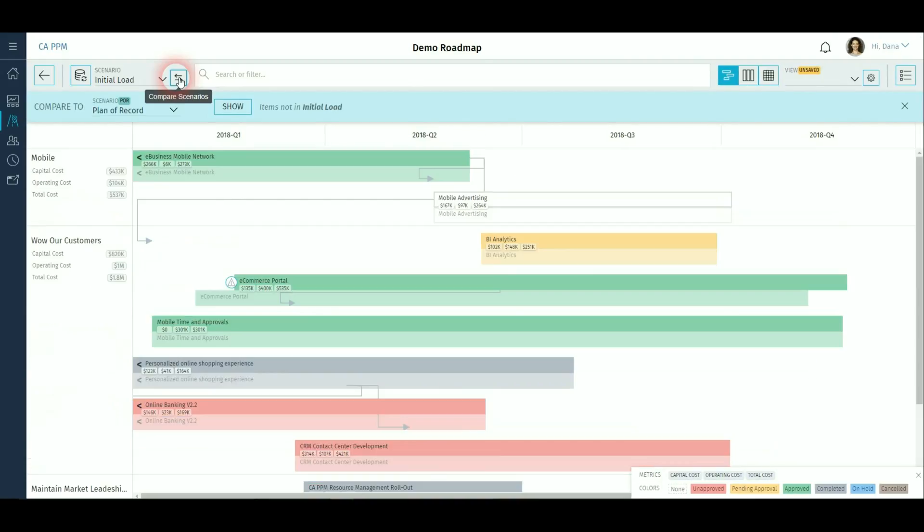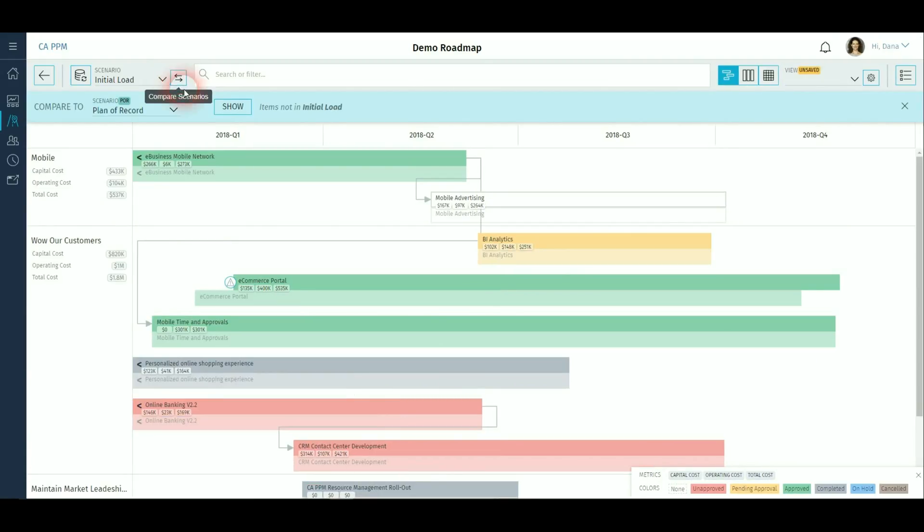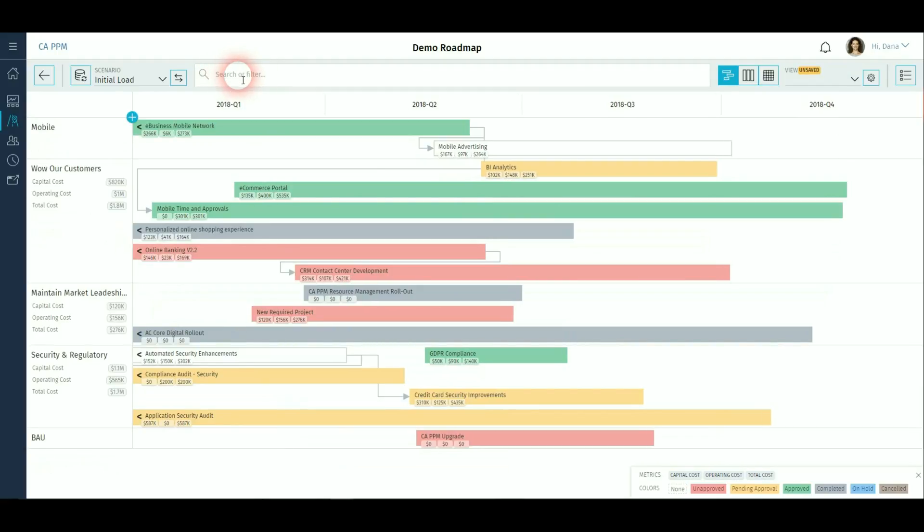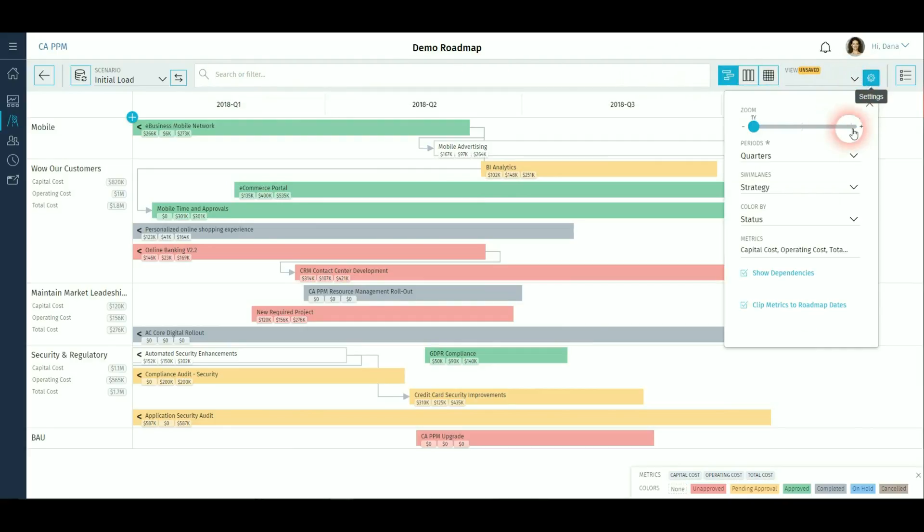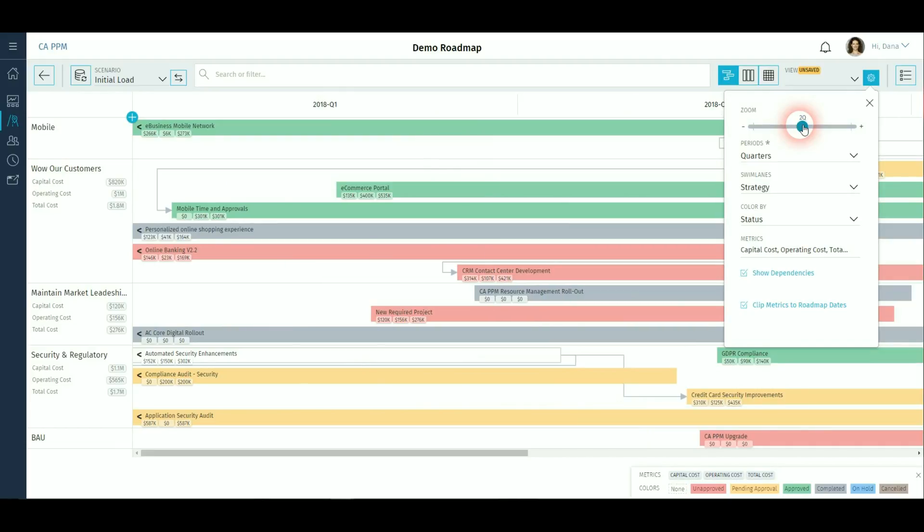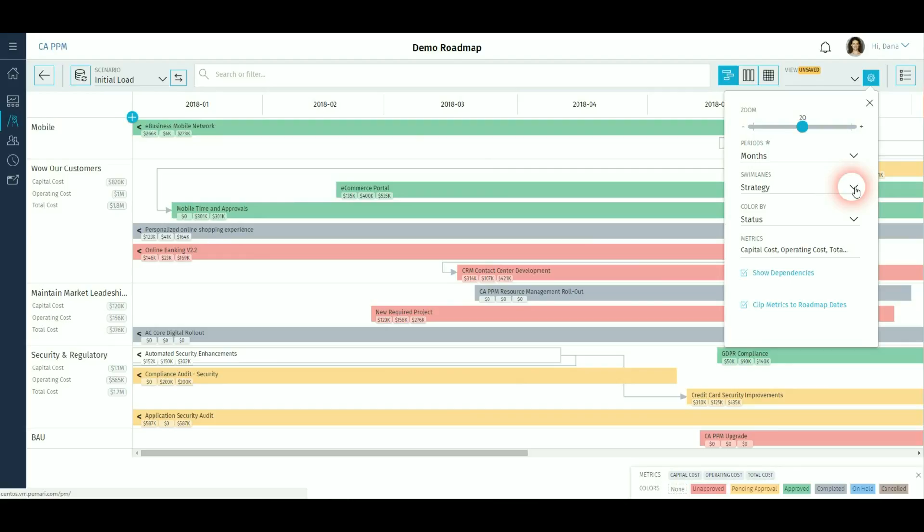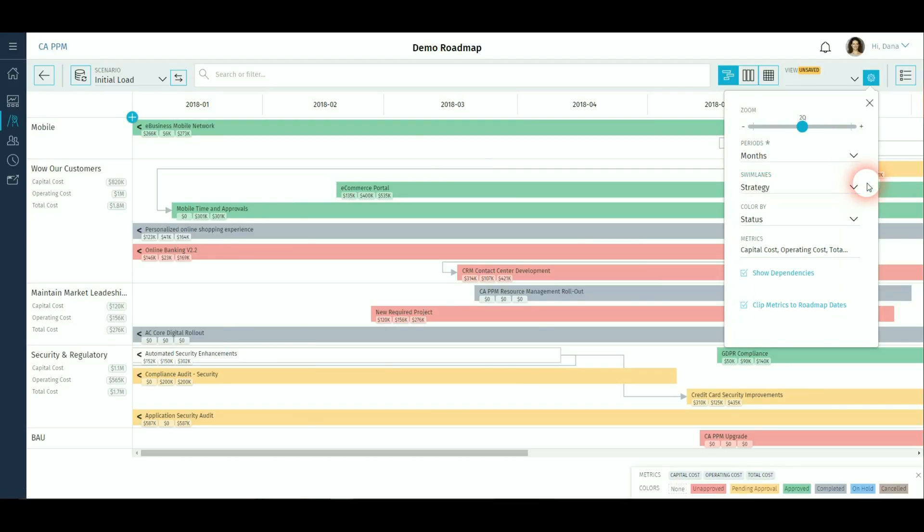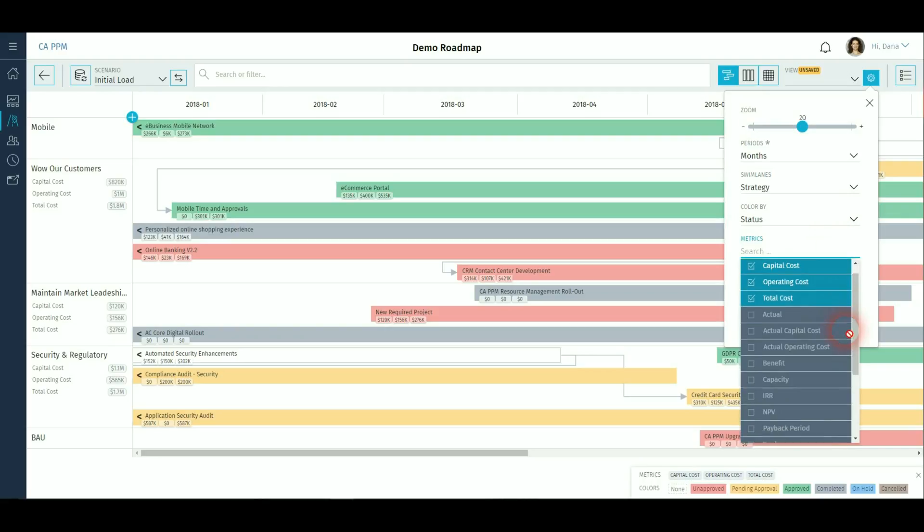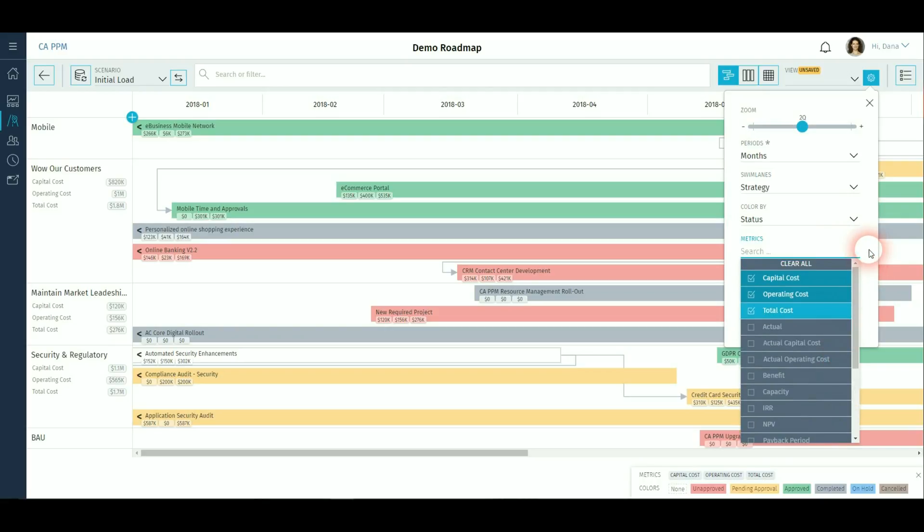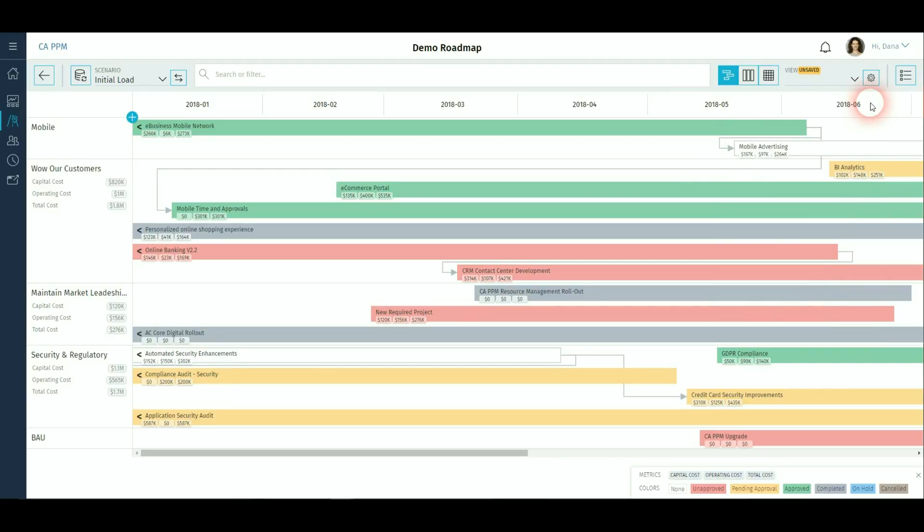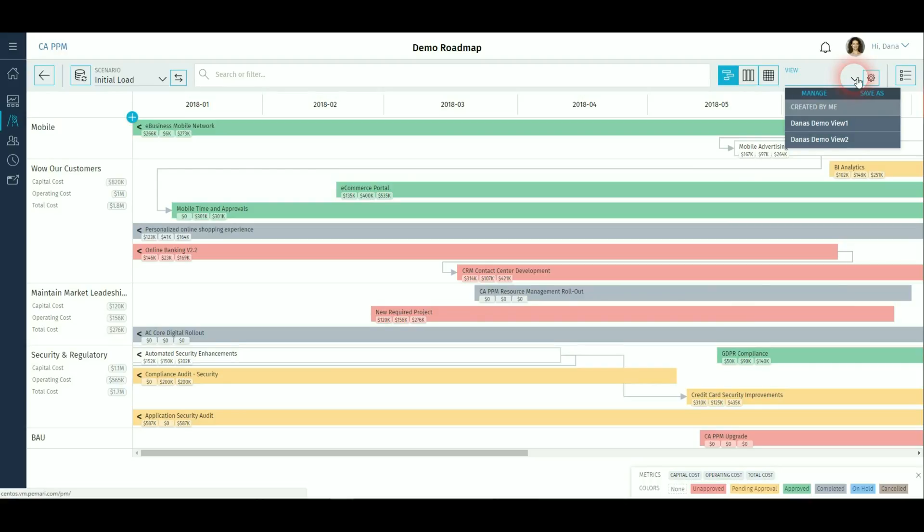You can have multiple scenarios in a roadmap and use these for comparison in real time, viewing the differences signified by the delta icon. You can filter for items in a roadmap. You can zoom in on the timeline and set the periodicity and change how swim lanes are organized and also create your own via pick lists and set the colorization. Also set what metrics you want to show on the roadmap and if the items span more than the roadmap time length, the metrics can be clipped rather than show whole-of-life values. Save multiple views of this information so that you can see this how you want and not others.